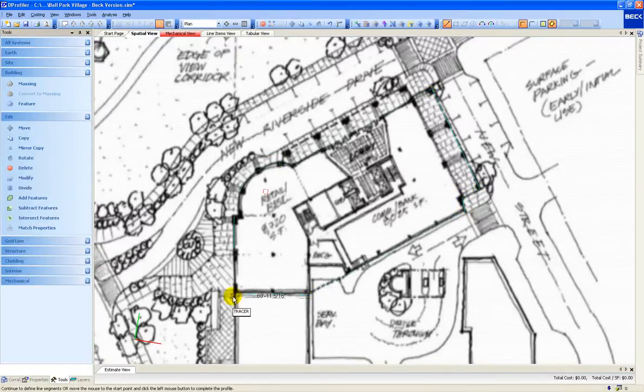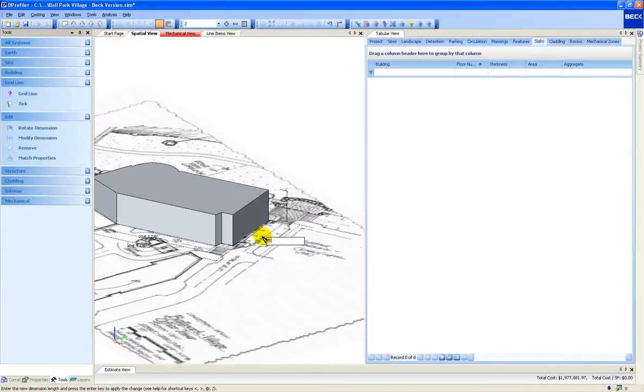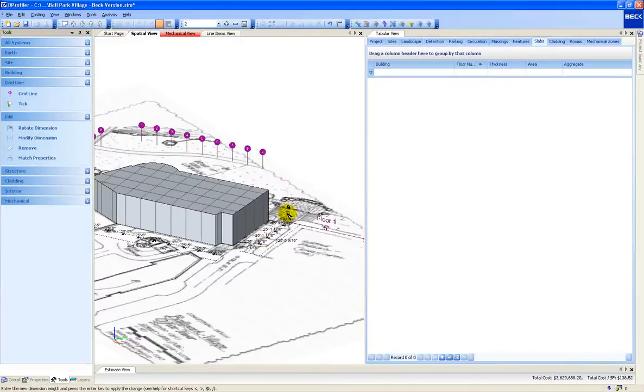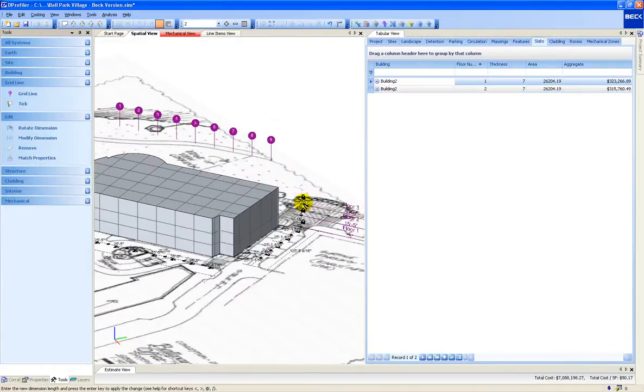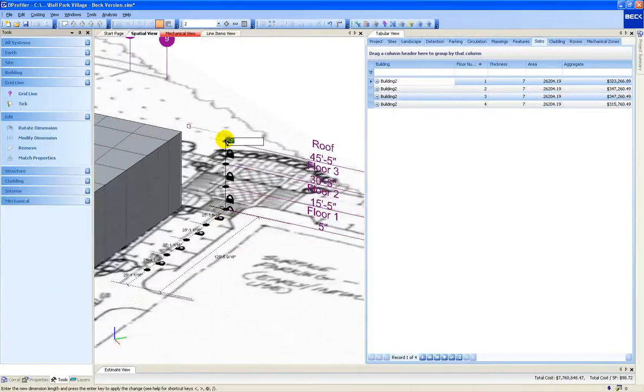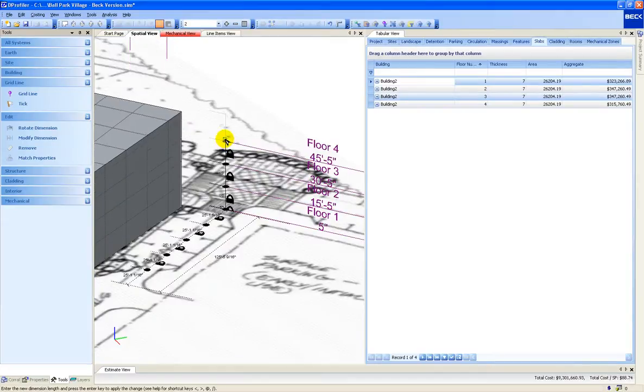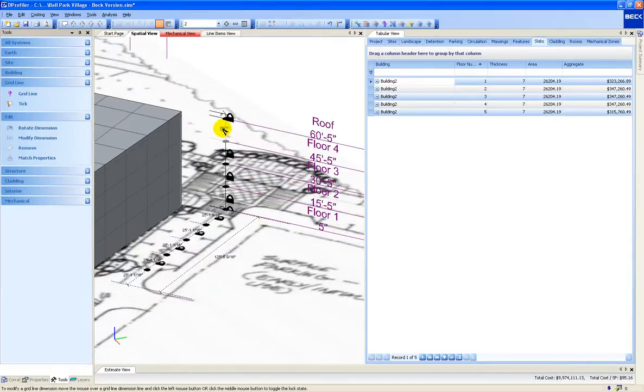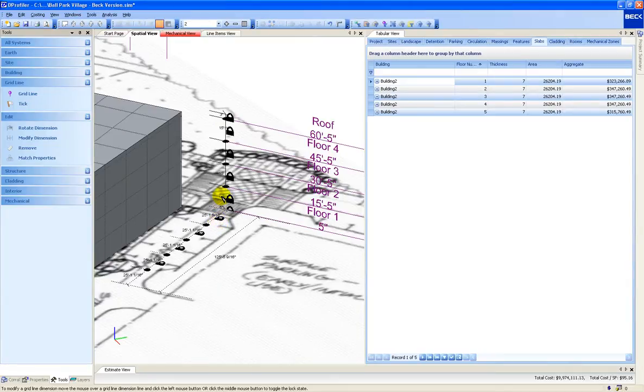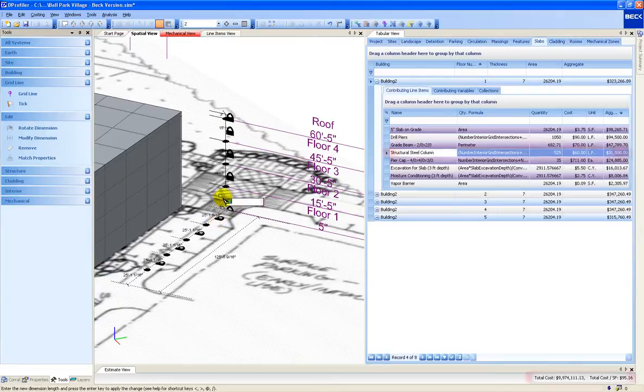A unique aspect of this technology is that costs are calculated in real time. As the model is being created, an estimate is being created simultaneously. More importantly, any changes to the 3D model will immediately change the cost estimate.